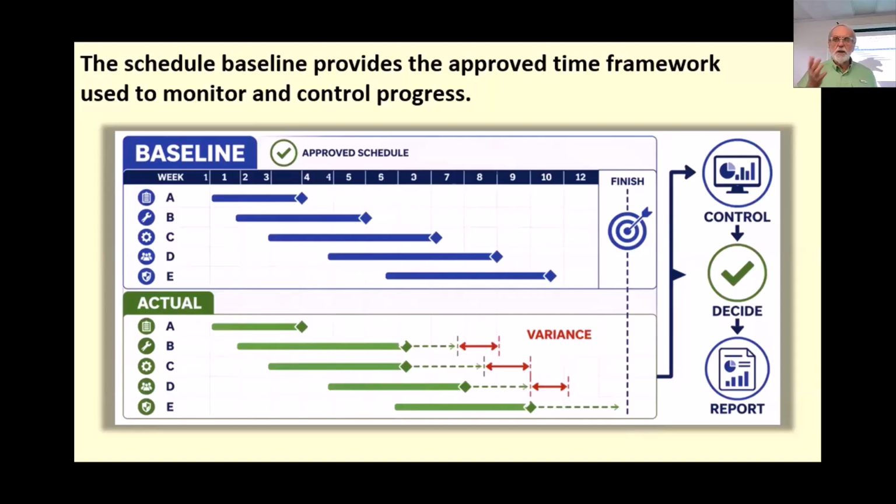Now, if you start having enough change, you're implementing change control, and the variance from the original baseline gets a little bit big, every so often you can save a new version of that baseline and keep it updated as you go. But in practical terms, the schedule baseline is essentially the agreed version of the schedule against which actual progress is compared. Without that baseline, it becomes difficult to determine whether the project is truly on track or behind or ahead of schedule.